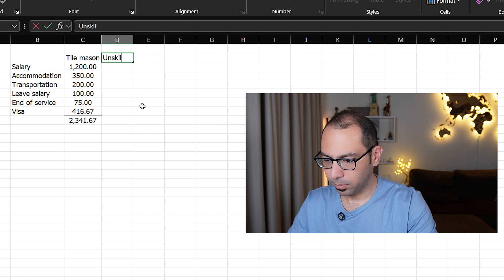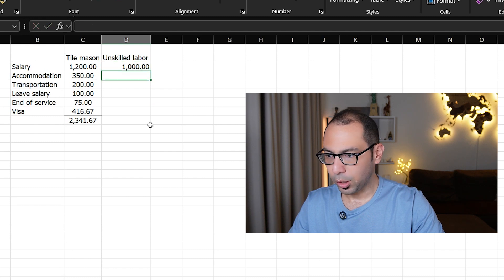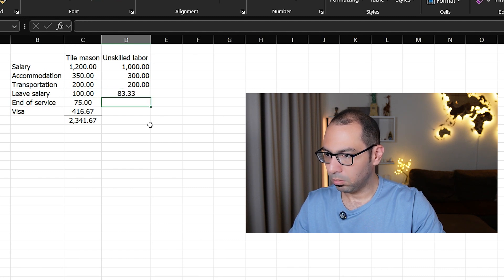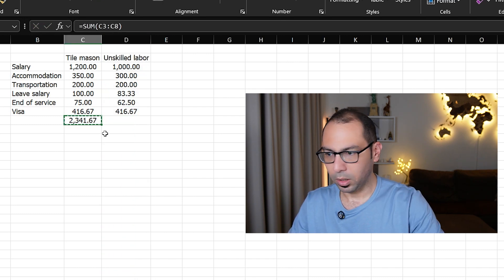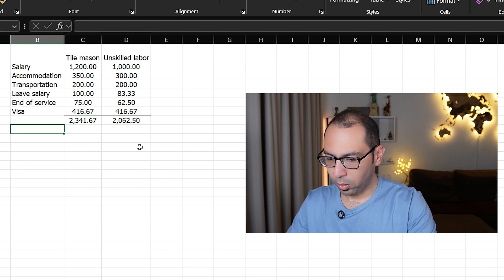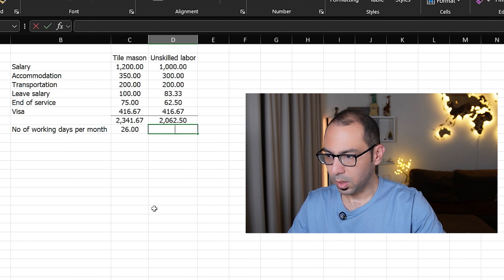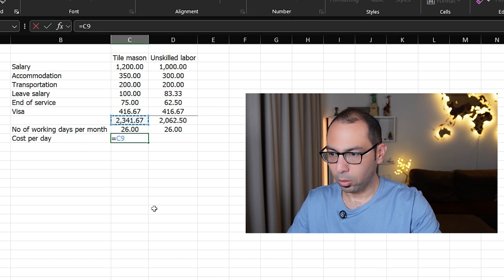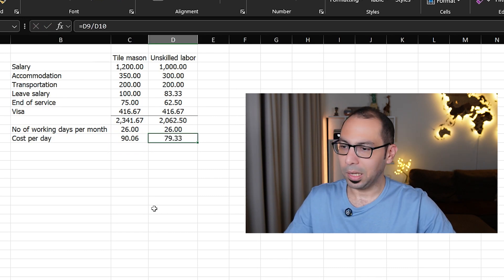For a helper or unskilled labor assisting the tile mason, the salary is 1000, accommodation 300, transportation the same, and leave salary, end of service, and visa cost calculated with the same formulas. If the number of working days per month is 26, dividing the monthly cost by 26 gives the cost per day for both skilled and unskilled labor.